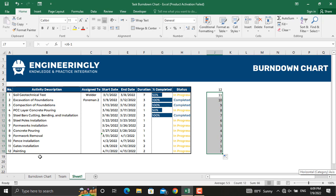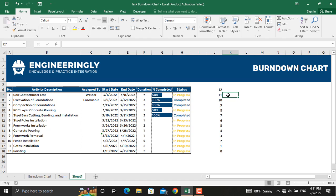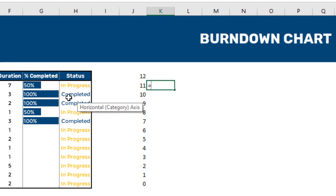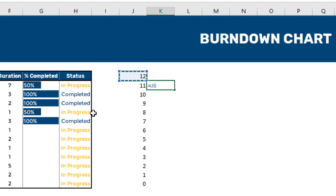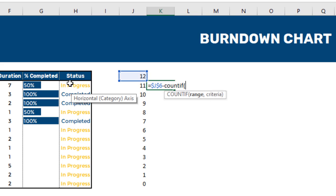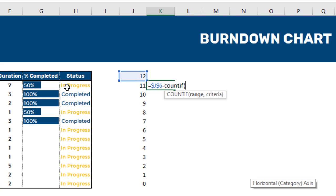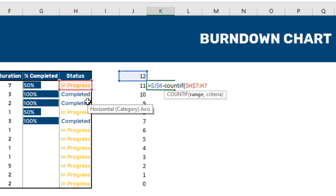Next is our actual data. I'll write the formula: equals the locked total value — dollar sign on both column and row — minus COUNTIF. The range for activity one will be only that cell; for activity two it expands to two cells, and so on. The range starts from $H$7 up to the current cell, so as we drag it down the range expands. The criteria will be 'Completed'.